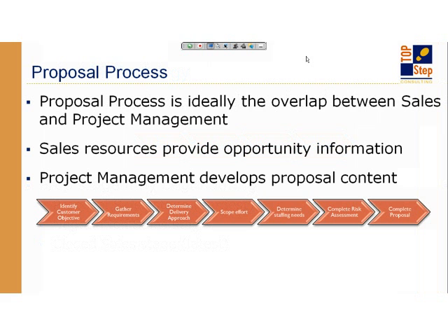So the proposal process is ideally the place where the overlap happens, where sales is working with the services teams, potentially project managers, in developing that proposal. And really the proposal scope of what I've worked with companies to develop a proposal process usually starts with identifying what is the customer objective, gathering their requirements, which may or may not be done by services and may be done by pre-sales, but then the pre-sales teams are working with the services teams and the project managers to determine the delivery approach for those requirements.